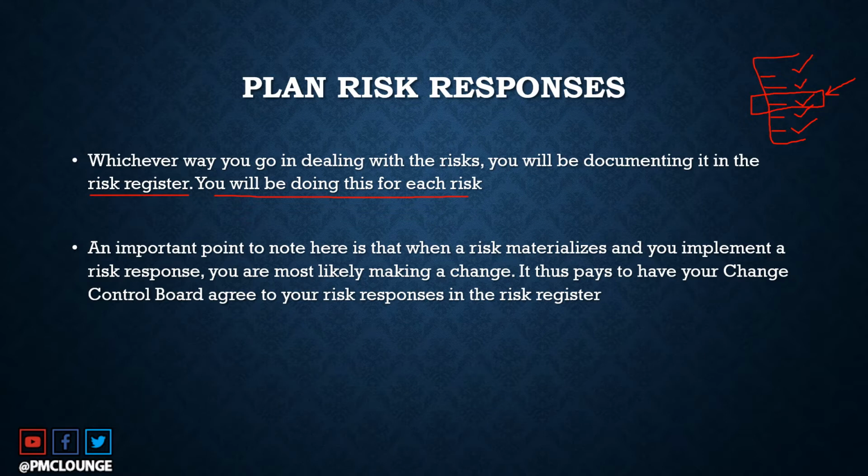Now, you may have kept this $200 as a reserve, but you would require your change control board's approval to use those $200 in your project. If your change control board already had an idea that this was one of your planned risk responses, if the risk were to materialize, your change request will be approved fairly quickly because they were already aware of your risk responses.